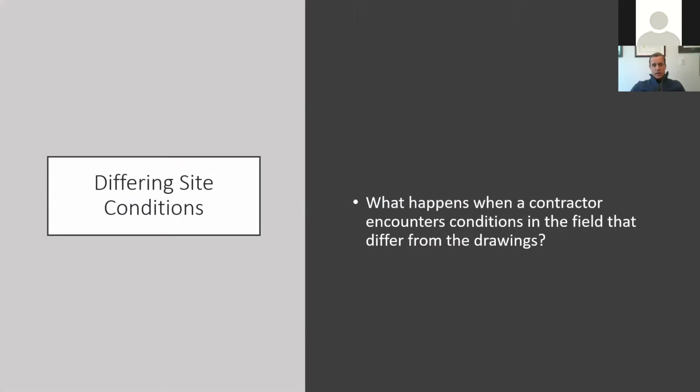The reason the change orders concept is related is that when a contractor encounters differing site conditions, and the work it is required to perform is different than the work it anticipated when it presented its proposal, that's going to lead to change orders. It's important that change orders get paid from the contractor's perspective, because it could be the difference between a profitable or unprofitable job. If the change orders are significant enough, you're talking about mission critical payments that could continue the life of a contractor.